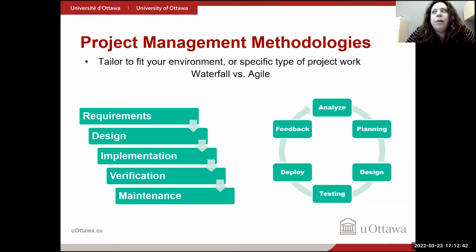I think when you use an agile approach, though, you have to really make sure there's the appetite for that, because it can be more expensive because you are often involving more people. And it's a little bit trickier to determine when your project is done because there's not that clear cutoff phase. But that's not to say an agile project doesn't ever end.